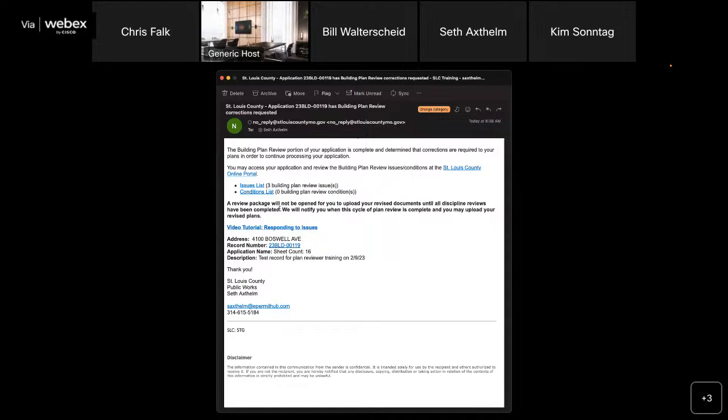And as with other emails, we have a link that we can click to go ahead and check out what those issues are. But there's a disclaimer right here in bold. The way this is going to work is we are going to publish comments as each review completes. If they found any issues they need you to resolve, we want to get those comments in your hand as quickly as possible. But we are not going to open up the portal in the form of a new review package